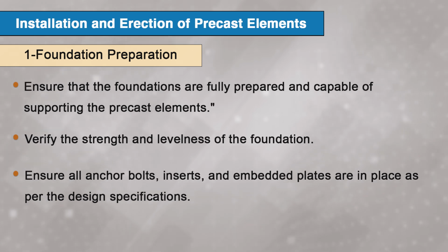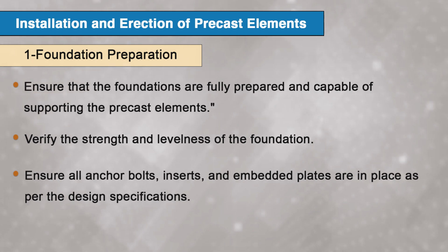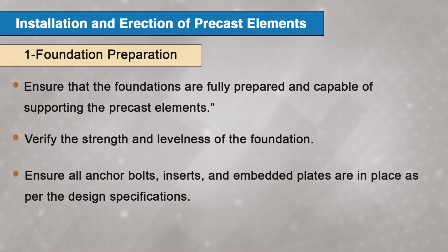Proper foundation preparation is critical as it impacts the alignment and stability of the entire structure. For example, for a precast wall panel, the foundation must be perfectly level to avoid any misalignment during installation.